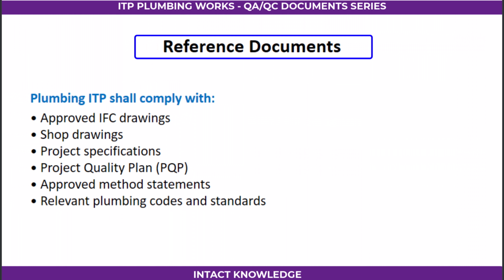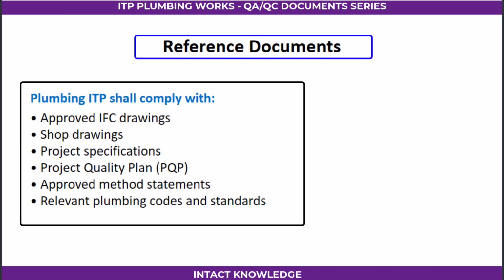Reference documents. Plumbing ITP shall comply with approved IFC drawings, shop drawings, project specifications, project quality plan (PQP), approved method statements, and relevant plumbing codes and standards.